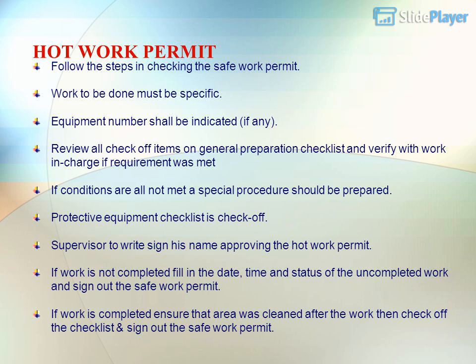If work is not completed, fill in the date, time and status of the uncompleted work and sign out the safe work permit. If work is completed, ensure that area was cleaned after the work, then check off the checklist and sign out the safe work permit.